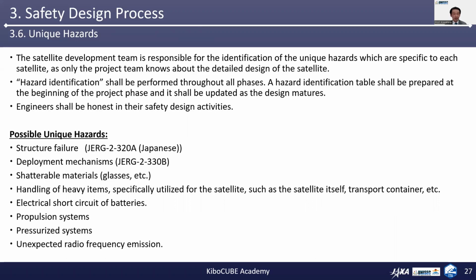A hazard identification table shall be prepared at the beginning of the project phase, and it shall be updated as the design matures. It is very important that engineers shall be honest in their safety design activities, as it matters to consider the lives of human beings.